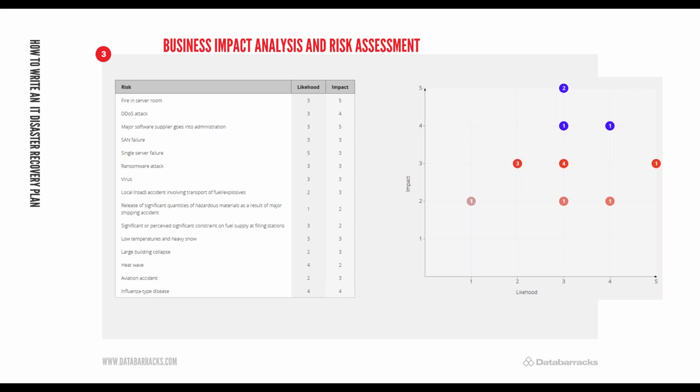So obviously you're going to have low impact, high likelihood, and also very likely and low impact, and the ones that you're perhaps not bothered about are those in the bottom left of that grid there. So anything that's 1, 1, 2, 2. So those aren't the things where you need to focus your attempts. But if your office sits in a floodplain, you might find that a flood risk sits in the 5-5 or 4-5 sort of area. And equally, cyber is likely to feature prominently as well. So that's where you focus your attempts, and that's what you're prioritizing.